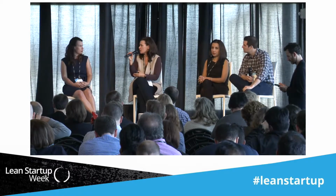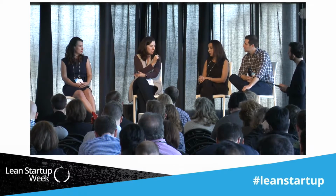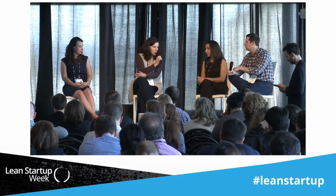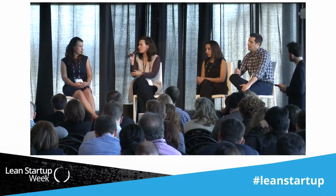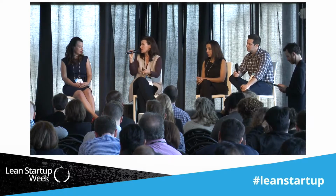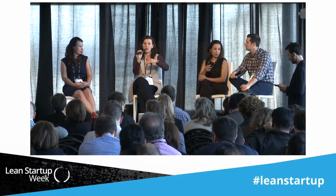And in each one of those 7 weeks, the first week we tackled email communications. The second week we tackled meeting communication, like meeting in person and those types of communications. Then the following week we tackled opportunities. The following week we tackled accounts. The following week we tackled my work overall.